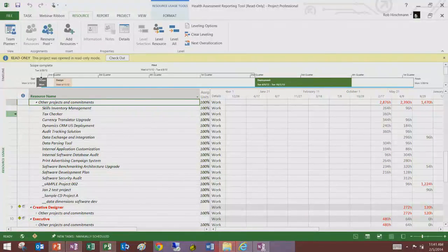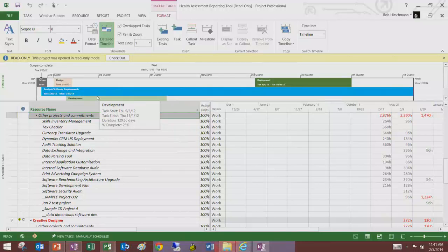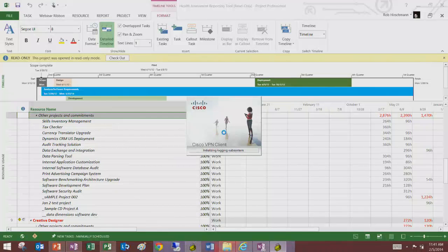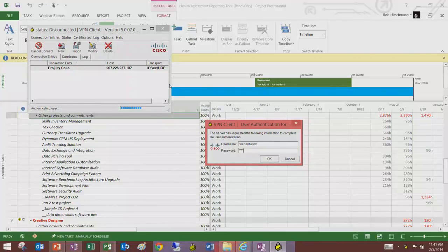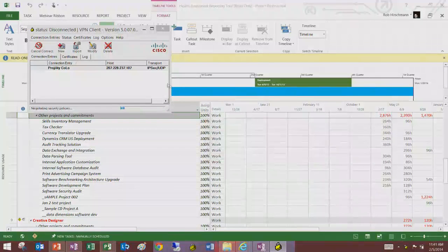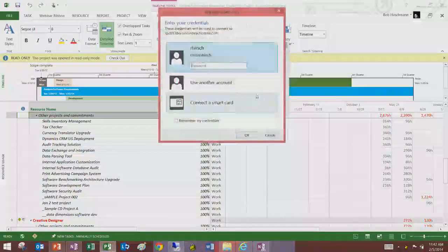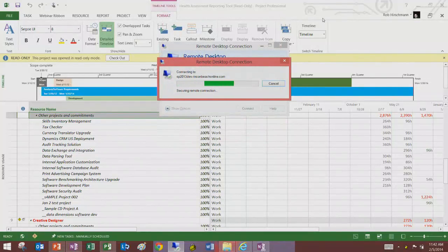There again, there's a best practice, which is not enforced in the system, but usually one person has only one role, or at least a primary role, because this is necessary for capacity planning. If someone is a DBA who can work on SQL and Oracle, well, his capacity should be rolled up to what? So usually you start with a custom field for role that only allows single value selection. And if you want another custom field for skills that would allow multi-selection, this is a secondary field.